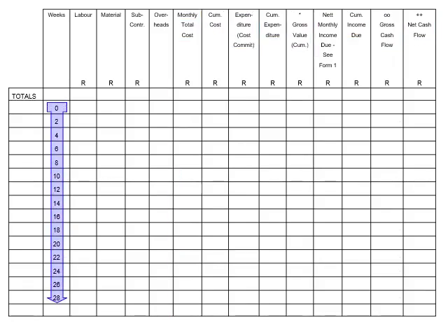The purpose of lines on the worksheet is to provide for the timing of the budget. Depending on the budgetary requirements of a project, the timing of the budget is flexible, and you may choose to record information every week, every 2 weeks, or every month, etc. For the purpose of this example, we shall record information on a fortnightly basis. The reason for this is that labor will be paid every 2 weeks. The process of transferring information, and using it to calculate the advanced information, will be explained on the slides that follow.